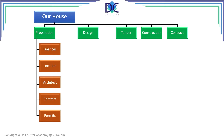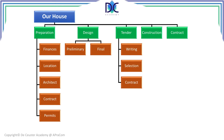For preparation, we can look at the financial situation, location, selection of architect, types of contracts, and permits that you need. For design, we can split it into the preliminary design and the final design. We have to write a tender, make a selection of the people who replied to the tender, and then following that, make a contract.